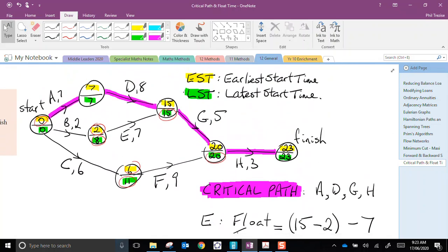And here's the other thing, you can't give the maximum amount of float time to all of the jobs, otherwise you will end up pushing things out a little bit. If I gave 6 minutes of float time to job B, so if I let job B sit idle for 6 minutes and then the 2 minutes of the job, we get to this point, 8 minutes.